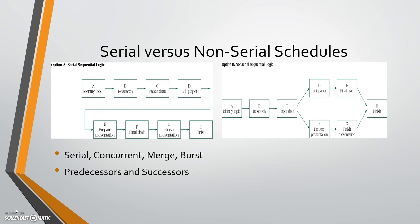Serial obviously means that things are going in a certain order. Concurrent means they're happening in parallel. Now there are things called merge activities — basically where several activities merge into one. On the right picture here you can see F and G merging into H. This can happen anywhere within the schedule where two or more activities are merging into one task or one activity.